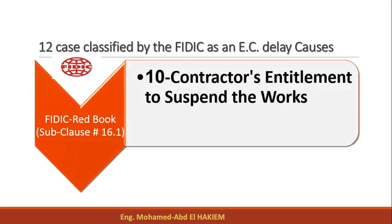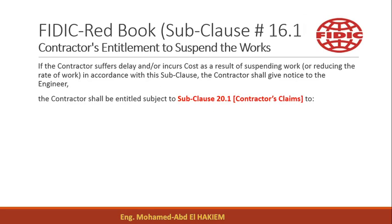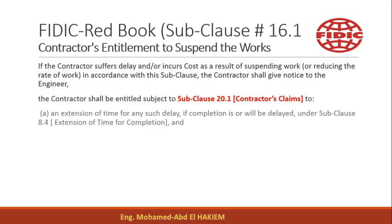Cause 10 – Contractor's Entitlement to Suspend the Works. If the contractor suffers delay and/or incurs cost as a result of suspending work or reducing the rate of work in accordance with this subclause, the contractor shall give notice to the engineer and shall be entitled subject to subclause 20.1 (Contractors' Claims).